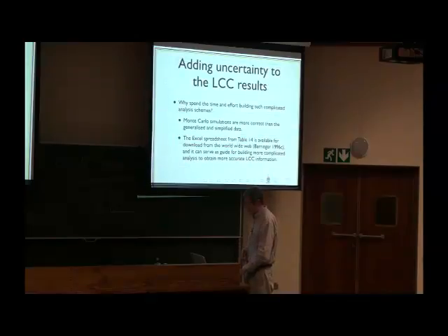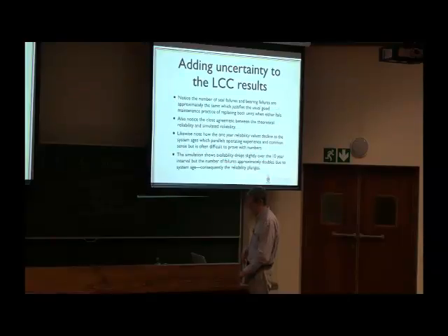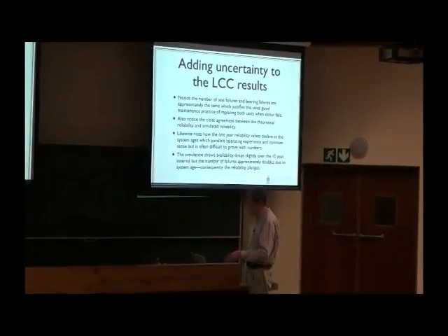Adding uncertainty to the lifecycle cost, why spend the time and effort building such complicated analysis schemes? Monte Carlo simulations are more correct than the generalized and simplified data. The Excel spreadsheet from Table 14 is available for download from the World Wide Web and can serve as a guide for building more complicated analyses to obtain more accurate lifecycle cost information. Notice the number of seal failures and bearing failures are approximately the same, which justifies the usual good maintenance practice of replacing both units when either fail. Some comments regarding that.